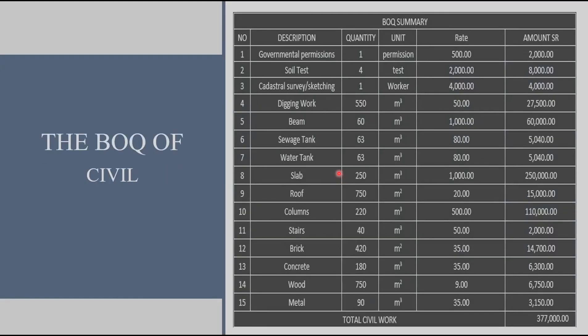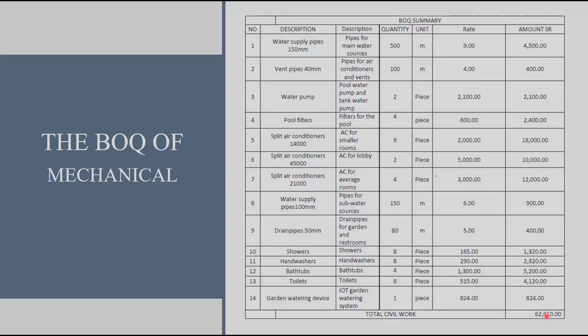The bill of quantity is one of the most important aspects in the planning stage since it shows the budgets needed and the material. It can make you imagine final product after knowing its ingredients. Here we can see the civil BOQ and the total cost is about 377,000.